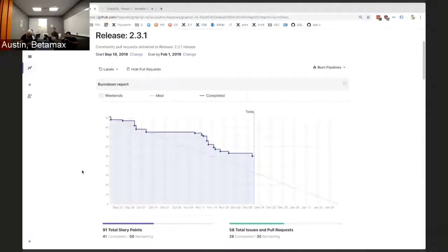So we can only guess that sometime in February we'll do a code freeze for scope, and then we'll do a period of stabilization like we always do, and then the release will be viable only after we feel good about the quality of the code. Does that make sense? Cool.